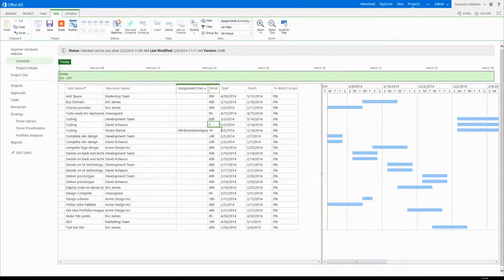So the only thing you can modify is the work of a task, the start, the assignment, the work, the start, finish, and units, which is not on this page. Those are the only 4 fields that the client allows you to edit. Everything else you want to edit, you can edit in the desktop client, and you can really get into the time phase data of it. Actually, this assignment is going to happen 8 hours on this day, 4 hours on this, 3 hours on this day. You can arrange that contour. You can't do that here. It's a very plain peanut butter kind of assignment that happens.